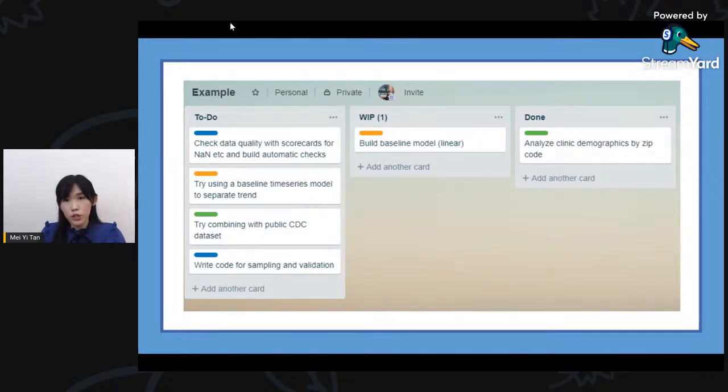And then in terms of the proportions of time, it also depends. For our typical data analytics projects, we can do it within 1 or 2 months. Within 1 or 2 months, we are able to keep track of all this data and identify it. Then we spend around 4 weeks to work on the data cleaning. So the timeline is actually defined by your data analytics team. We don't have a very specific answer for that because it all depends on how much data is involved. In simple words, it's how many data sources are involved.